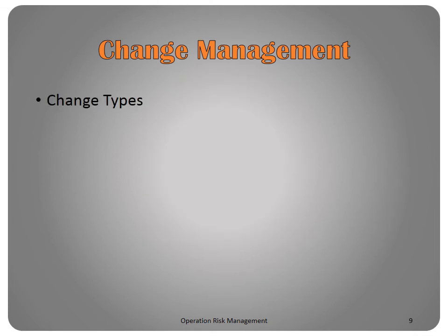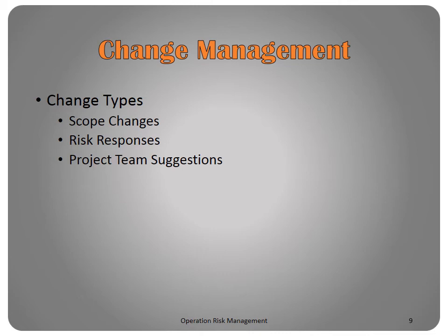Changes typically fall into 3 categories. These include scope changes, often from the customer, that add updated designs or features to the project. Changes may also be implemented as a response to risk events. Lastly, changes may come from the internal project team.